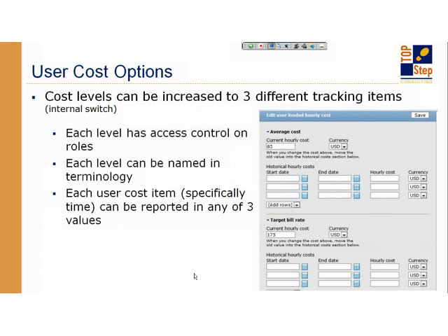So maybe we should just stick with banded costs, which is a great option as well. All project managers are at one rate. All senior consultants are at one rate. So it's known that if you're in different jobs, you would typically cost different to the company. But that means that your cost tracking is an approximate. So you're hitting an approximate margin, an approximate cost, and an approximate profitability based on people.